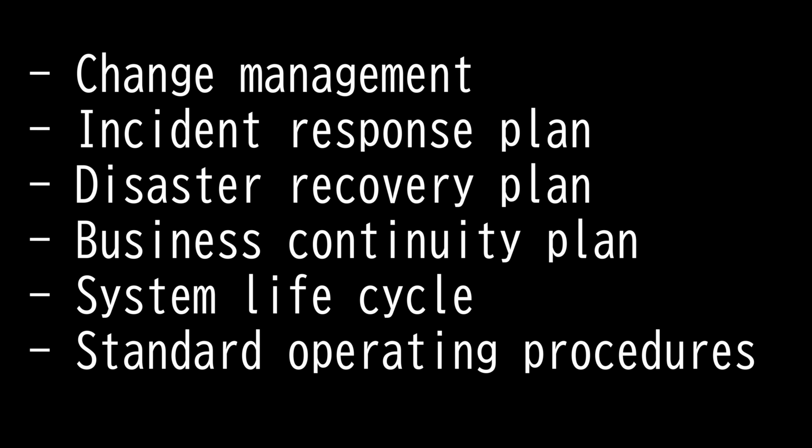This is a collective term for all approaches to prepare, support, and help organizations in making a change. Before making any change at all, the first question is to ask why. Change requested by one user may be based on misunderstanding of what technology can do, and it can be cost prohibitive, or may deliver a benefit not really worth the undertaking. Network admins should be involved in reviewing change request submissions. The official process should be in place to evaluate and approve changes prior to actions being undertaken.